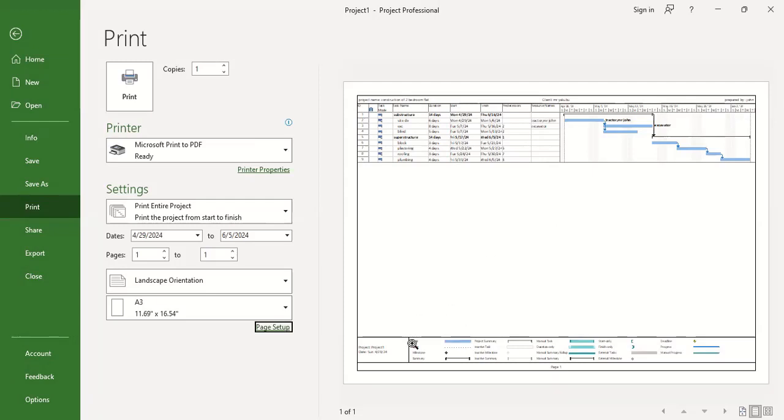Okay. Now, another thing is that you have a lot of legend here. Now, there's something showing here, project, whereby we have project 1. I want you to take note of that. Because under this project we already have a project name up here. So it's advisable, if you want this to show the name of the project, that at the time you are saving your Microsoft Project workspace, you save it as the name of the project. Because it picks the name; if you look at the title or the heading of our project, generally it is called Project 1.